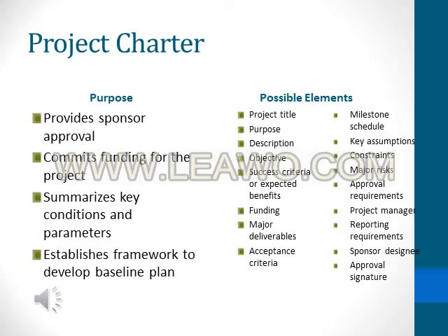Project Charter. Once a project is selected, it is formally authorized using a document referred to as a project charter, sometimes called a project authorization or project initiation document. These documents serve a number of purposes: provide sponsor approval to go forward with the project, commit the funding for the project, summarize the key conditions and parameters for the project, and establish the framework for developing a detailed baseline plan for performing the project.